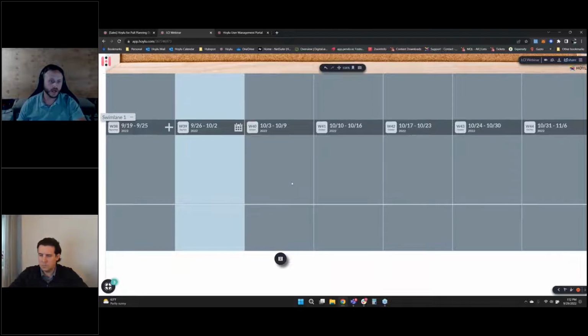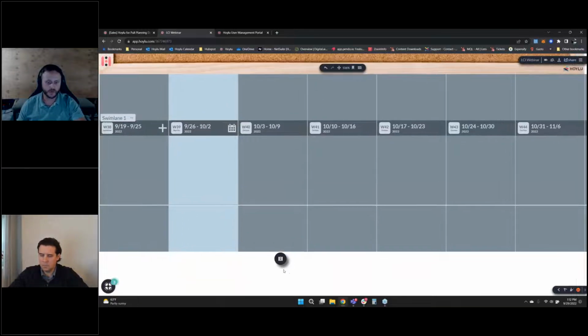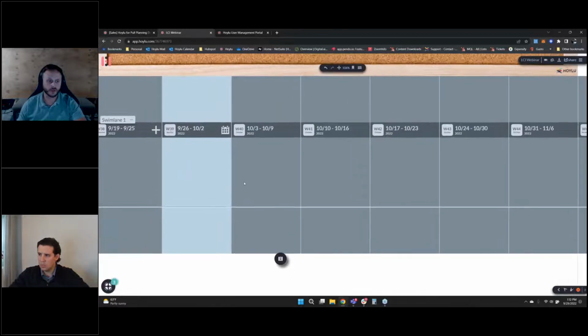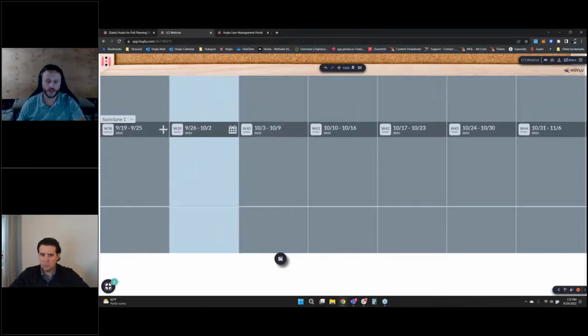And the other thing you'll notice before I get into anything is that we're looking at a weekly view. And this is intentional. We find that it's a lot easier to start off planning at a weekly level and then drilling down to a daily level. So I can tell you we're going to rough in electrical this week. Maybe I don't know exactly what those days are, and I'll have to drill in and get a little bit more specific. So we give you both those different viewing options, which can certainly come in handy.